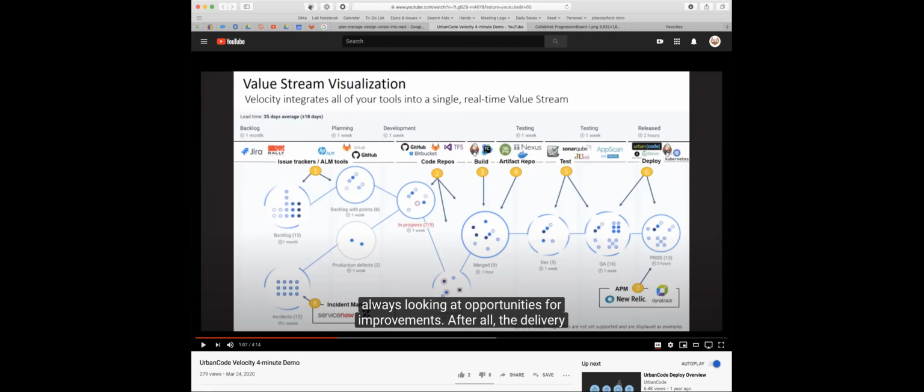I think one other thing about value stream, why it's important, is that at GitLab we talk about merge request throughput and having a certain amount per month per engineer. But one of the things we're not looking at is lead time. I think it was surprising when we did that ad hoc retro, when I brought up the data point that even omitting weekends, the average time an issue goes from ready for development till out of verification is 53 days, right? Yeah. So when you fragment your work across all these different things, you're actually slowing down delivering any one piece of value in its totality.